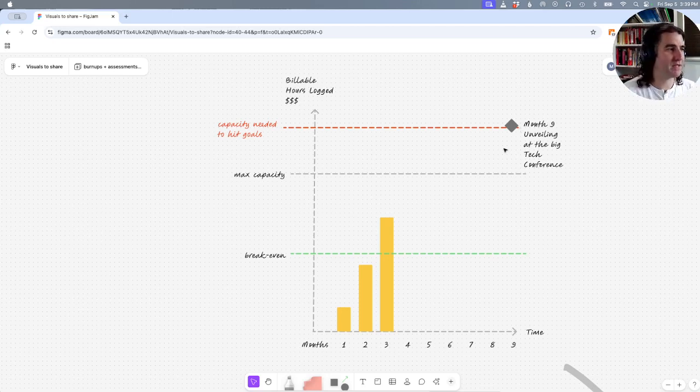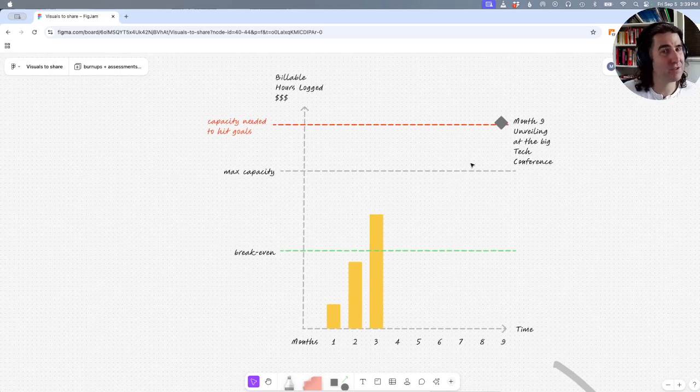And of course, one of the things we encouraged and did here is we made sure to work with the client to say, we may not hit all of these features in scope. So let's prioritize. Let's get ruthless about saying what is the most important thing, and we'll hit that first. And then if we manage to push that out and you're happy with it, and we removed all of the bugs that will screw you up at the conference, we'll work on the second one and the third one, and so on and so forth. So that is the approach that we took.